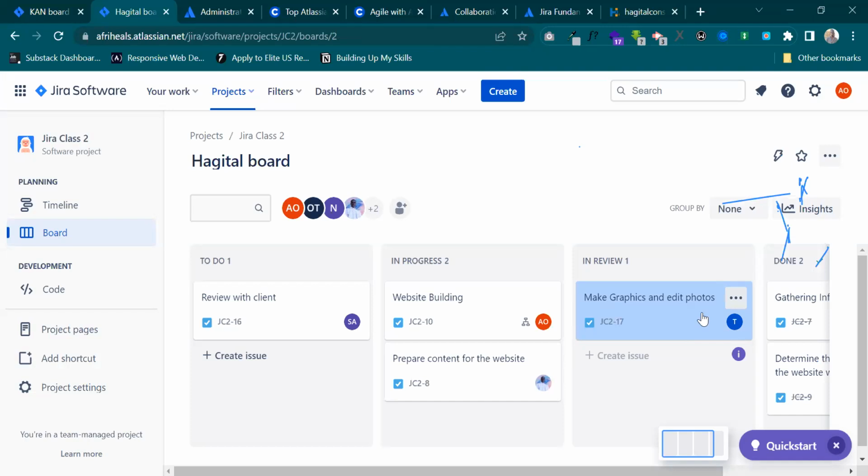Once you make that adjustment, I receive another comment and you'll be attaching a new file again because you've just done something. Then once that has been taken care of, I go over again, I review it. If your work is fine, I'll let you know in the comment section that the work is fine. And then I move it to done section. So you can't move it into done section until the work has been reviewed and approved.